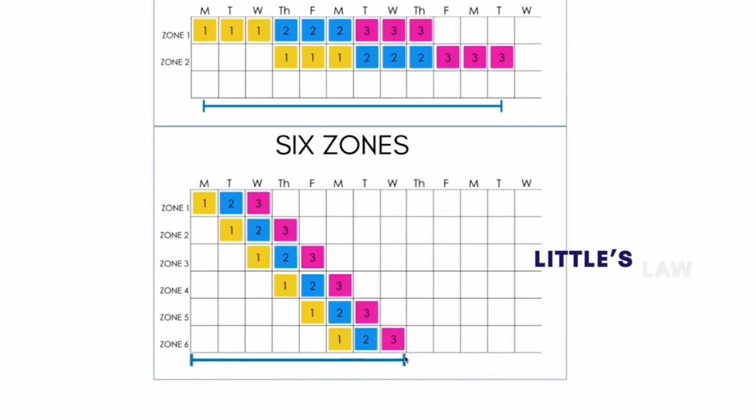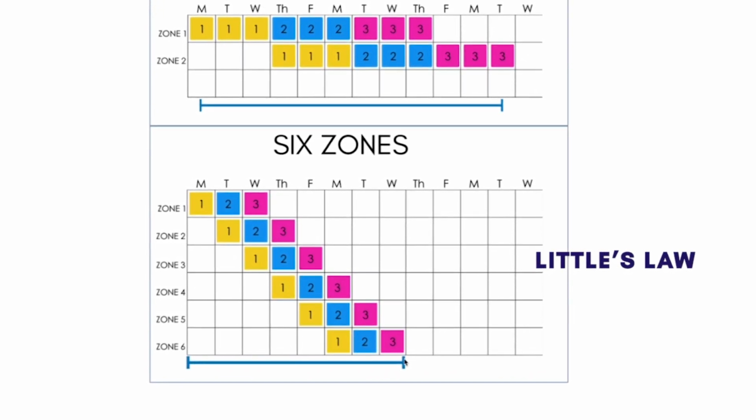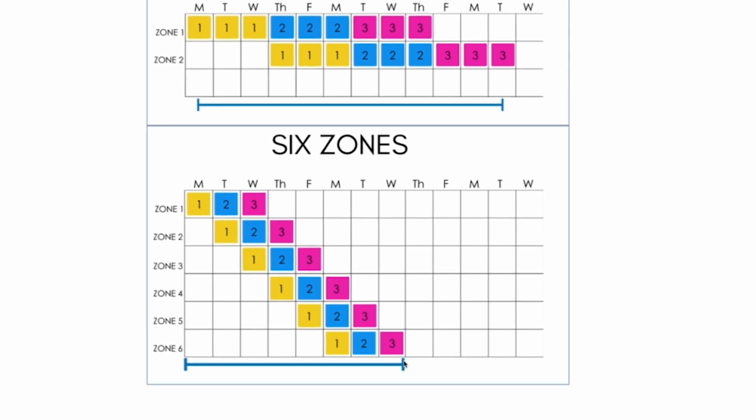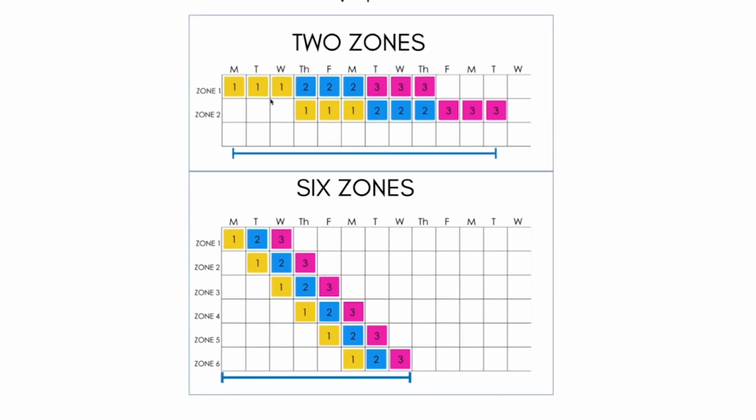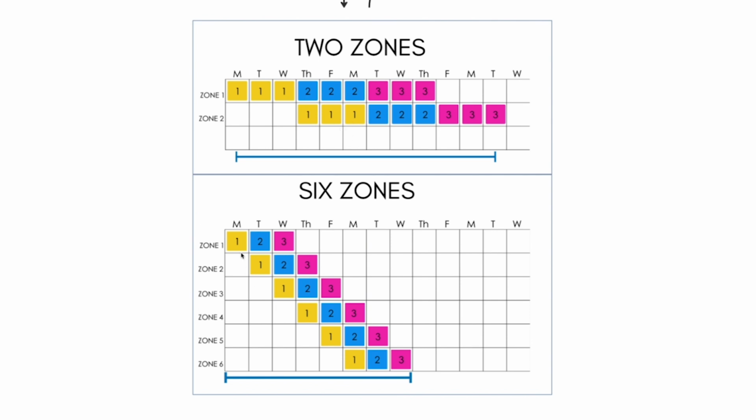This is called Little's Law, or the effects of Little's Law. And you might be thinking, Jason, I see what you did there. You're just shortening trade durations. Well, no, I'm not. You see, we have 1, 2, 3, 4, 5, 6, and we have 1, 2, 3, 4, 5, 6 down here. We did not shorten trade durations, but we were able to shorten the overall total phase. This is the magic of rezoning in the Takt Production System.